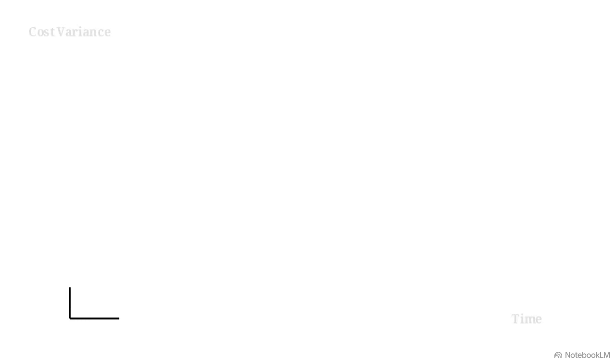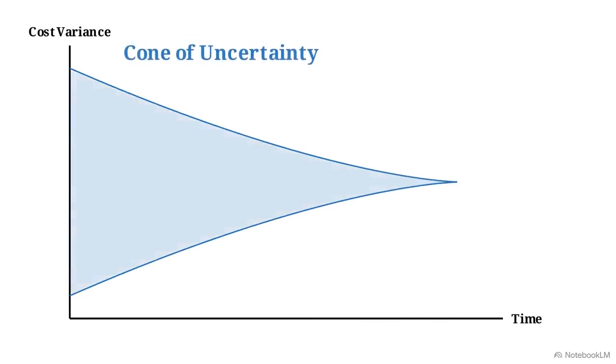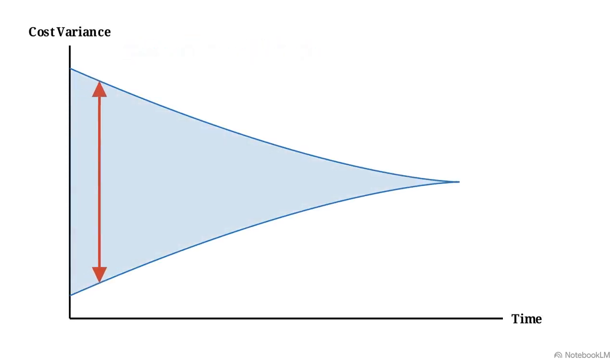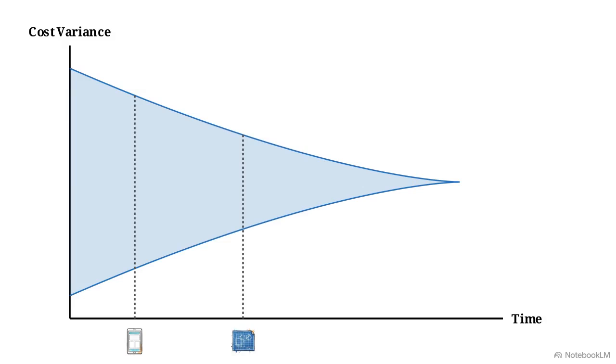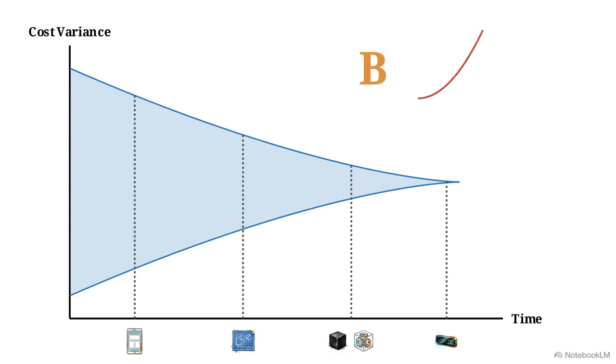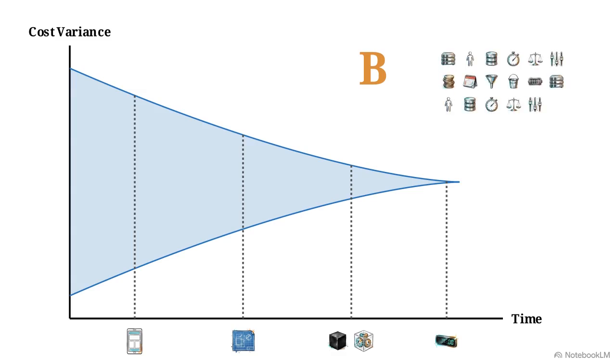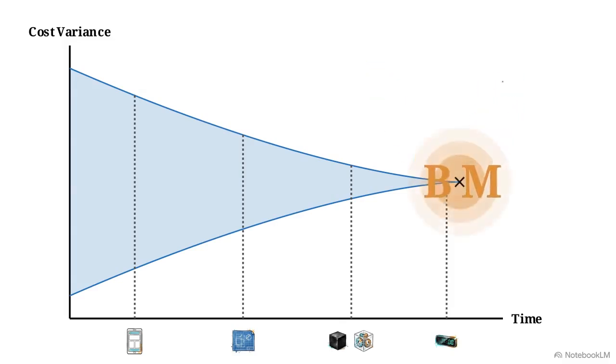These variables form the cone of uncertainty. Early in a project's timeline, cost estimate variance is wide, but narrows precisely as architecture locks. The 4 COCOMO submodels map onto this timeline, bringing wild early estimates into strict mathematical focus. When assessing a project, remember the core mathematical drivers: exponent B, accounting for exponential complexity, and the 17 cost drivers that make up the multiplier M.